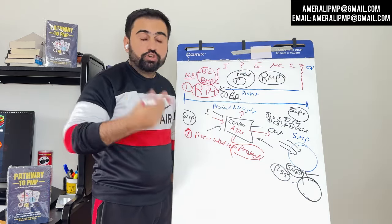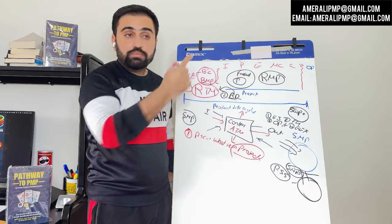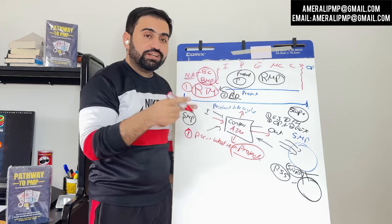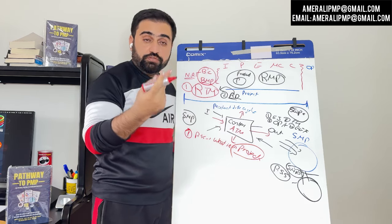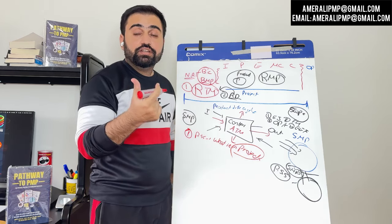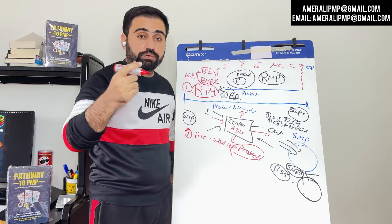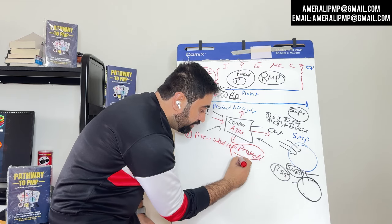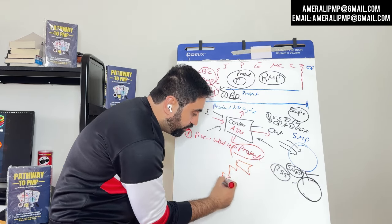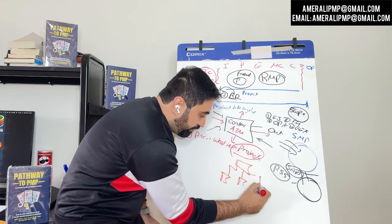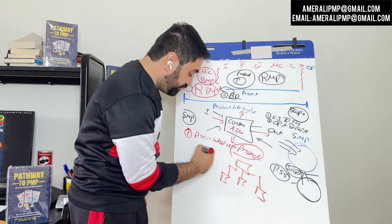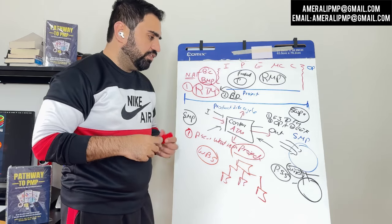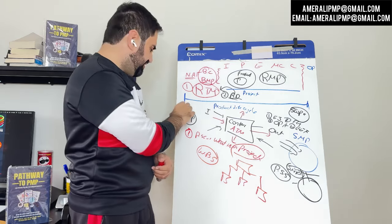Lee Lambardi, the founder of PMI — I'll put the interview here — said two things a project manager should know: one is the project scope statement, and the second is the Work Breakdown Structure, or WBS. So let's say our project is building a river. We take the project and divide it into small manageable parts — this is called the WBS, Work Breakdown Structure.